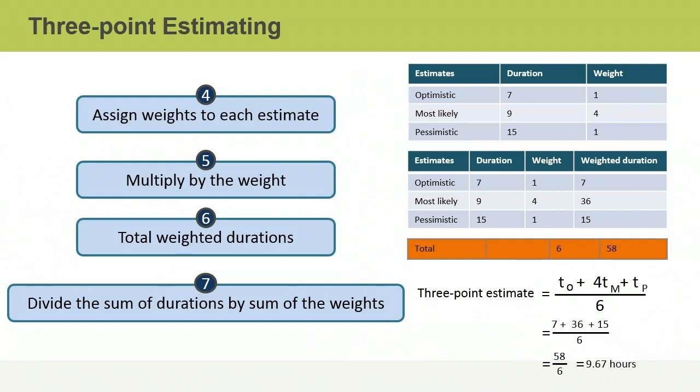In the final step of the process, you divide the sum of the weighted durations by the sum of the weights. The result is the 3-point duration estimate. In this example, the sum of the weighted durations is 58. The sum of the weights is 4 plus 1 plus 1, which is equal to 6. You then divide 58 by 6, which gives you a 3-point duration estimate of 9.67 hours.